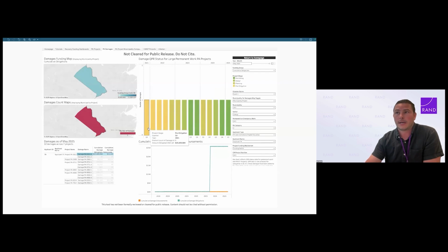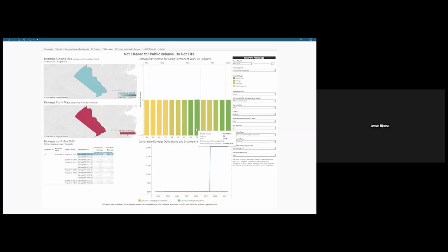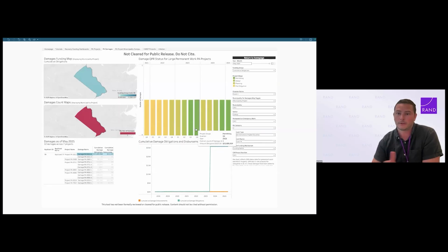And then looking at the status over time, it was in pre-obligation, and we can see it entered planning, design, was in permitting, and then dropped back to planning, went through that for 2 quarters, back to design, and now it's back in permitting again. So this allows you to at least see, it looks like something is holding us up with permitting potentially. It allows you to go out to stakeholders and start a discussion to see what the issue is here and if it can be resolved, and what might be causing this slowdown or this project moving back and forth in this implementation. Okay, thank you.